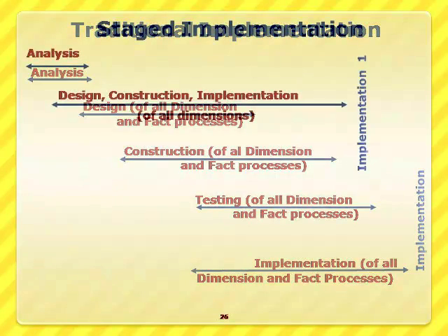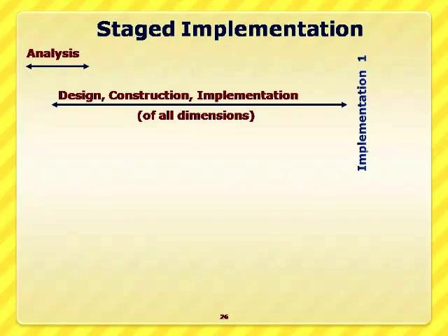See the next model. This is called stage implementation. In the stage implementation, I do the analysis, design, construction and implementation for all dimensions. I should not leave any dimensions out at the beginning of the data warehouse design, because adding a new dimension at a later stage takes more time and it is difficult to redesign the whole product.